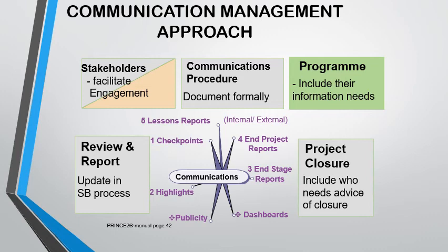Of course, we cannot consider the organization theme without mentioning how we communicate within the people. So, with the organization theme comes the definition of how communication will be handled. And we create a document that we call the communication management approach. Now, this document tells us how the roles and the people in the project management team will communicate within themselves, and also how the project management team will communicate with the external stakeholders.